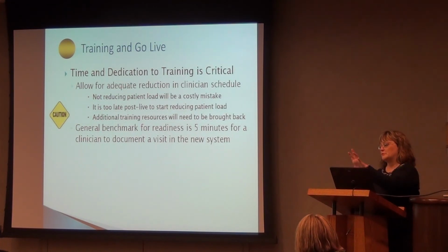Get the physician comfortable with the system. Stage 2 is actually doing the notes electronically, because that's a much bigger leap. I can order prescriptions, I can order labs, radiology, and then I will do my note on paper until I get comfortable with that, and then start my electronic record.